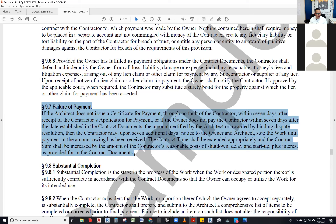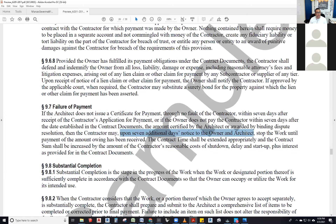Section 9.7: if the architect does not issue a certificate of payment — through no fault of the contractor — within seven days of receiving the contractor's application for payment, or if the owner does not pay the contractor within seven days after the date established by the contract documents, the amount certified by the architect or awarded by binding dispute resolution, then the contractor may — upon seven additional days' notice to the owner and architect — stop the work until payment of the amount owed has been received.